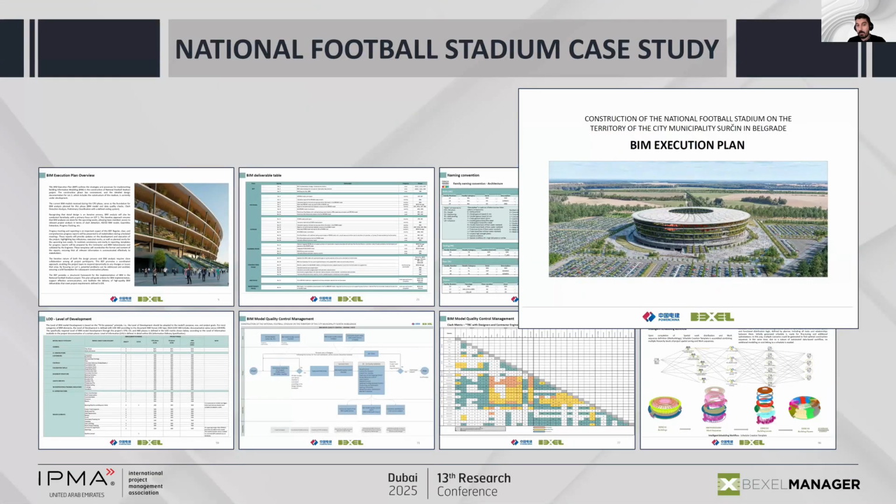The first issue that we had was how to, in a very quick period of time, establish the construction, the workflows, and the rules, and how to set up everything for the start of construction. So the first step was, as always, the BIM execution plan. We laid out a very detailed workflow of how every participant on the project will use BIM, what their intended workflows are, what they have to do on the project,